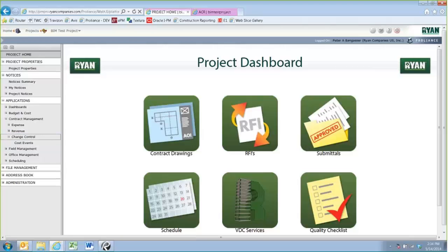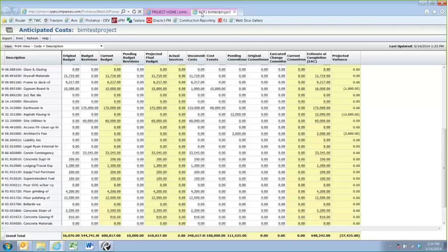As a best practice, I always recommend you open up your ACR, have that open, make the change, whether it's edit or workflow, save those changes, and then come back and refresh your ACR. The ACR won't automatically refresh, so you do have to force it to do that, but it reloads usually within 30 seconds and gives you the chance to verify that the changes you made had the impact you planned.